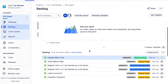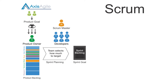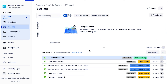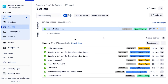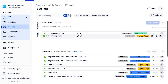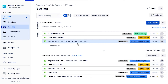The next step is to determine the team's sprint plan — what Scrum calls the sprint backlog. The sprint backlog gives us transparency over what the team has planned and how they are progressing day by day. A sprint backlog in JIRA can be prepared in a couple of ways. First, it can be done by dragging product backlog items into the sprint section — the team agrees on what they can fit, and those items become the sprint backlog items.